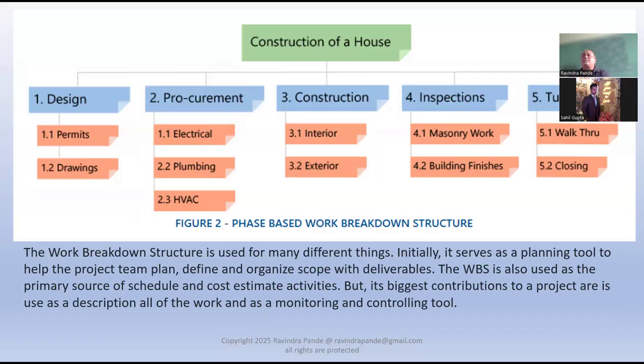And then I finish the building with the painting and the interior work like glass doors, handles, safety net, and other things, and then I hand it over to the client. So I'll basically plan a walkthrough. Whoever the house owner is, I'll give him or her a walkthrough. It might be many people, and then I'll close the deal. I'll say please release the final payments. So this is how I scoped out a complete work breakdown structure for a house.